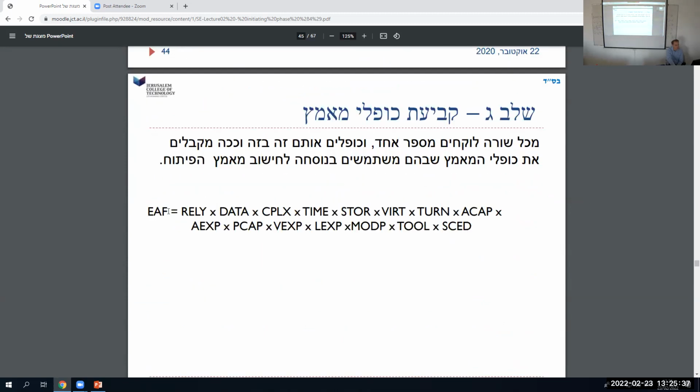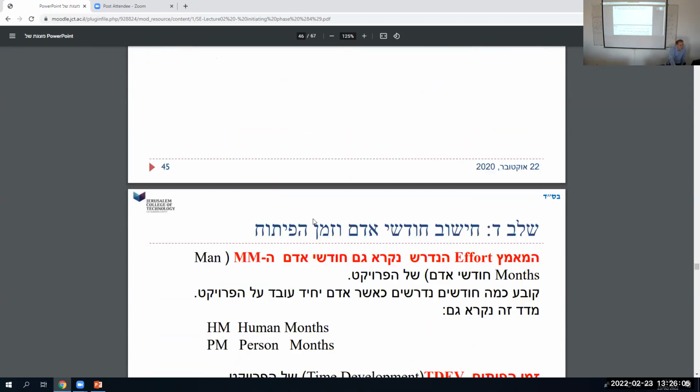Basically, you take all the things in the table, all those factors, and you multiply them. One might be 0.86, one might be 1.16. You multiply them all together and you'll get a number. That'll be maybe somewhere between 0 and 3 or 4. Maybe it wouldn't be much more than 3, I suppose, though it could be if everything was terrible. But you'll get some number.